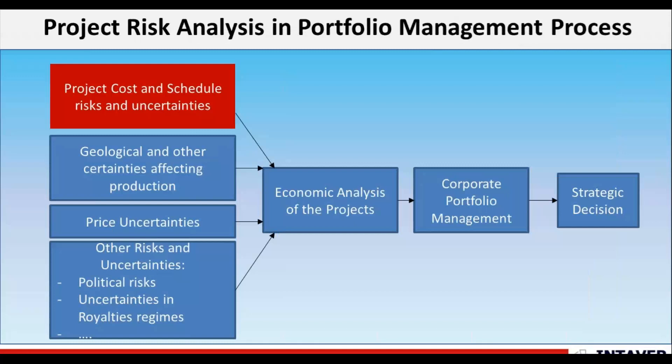Project cost and schedule analysis is one of the critical components in the corporate portfolio management process. It mostly affects capital costs, which together with prices, production, and royalties is an input to the economic evaluation of oil and gas projects. Risk can have multiple impacts — for example, a risk due to a safety concern will also impact reputation, cost, and schedule. These risk impacts on project costs and schedule must be analyzed consistently for all projects in the portfolio and propagated towards corporate portfolio management.